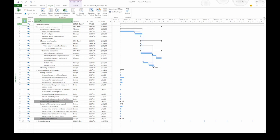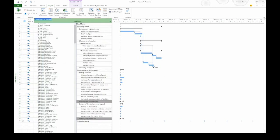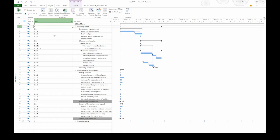Let's go ahead and insert the WBS field into this table. I'm going to right-click the task name heading and then choose insert column on the shortcut menu. The field name is WBS, so I type that in and press Enter.